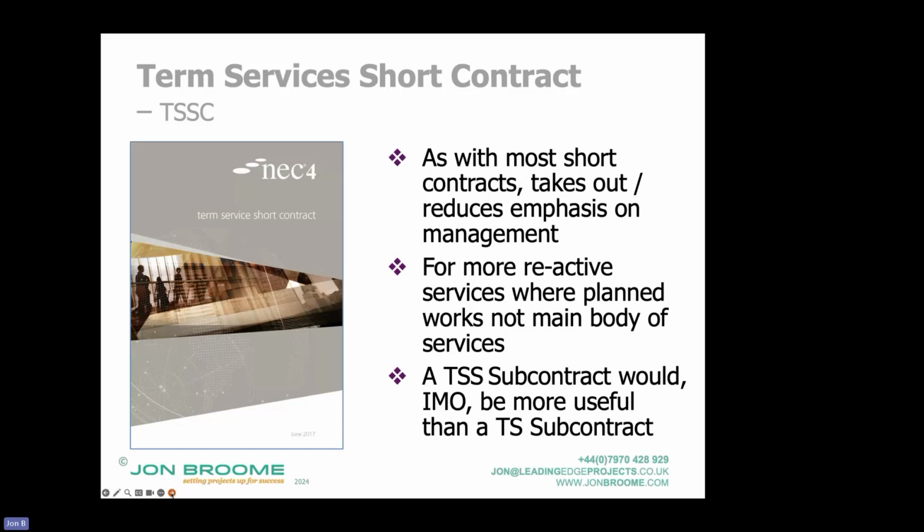So we had a schedule of rates to do a basic repair within 24 hours, a better repair within 7 days, and a full repair within 28 days. And we couldn't really plan it. It's just that when we said it, we wanted the people to come in and do it, and we had a rate for it. So it's for more reactive services where planned works are not the main body of the services.